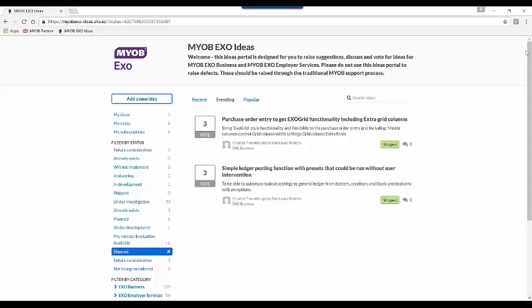Why would you use it? Progress billing is really mostly for your quote projects. Quote projects tend to be broken into stages, and those stages are often what you would bill out. So the progress invoice lines can be entered into the job either via the quote budget tab and then converted into an invoice, or they can be entered directly into the billing schedules tab. That's two different tabs in job costing.